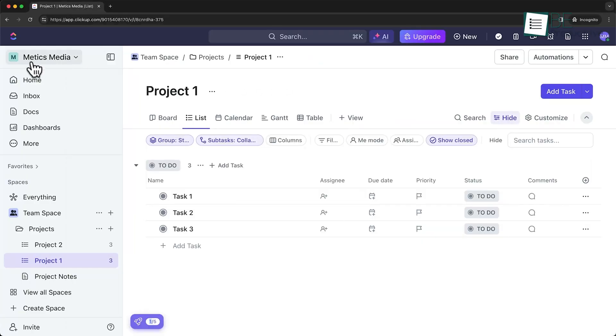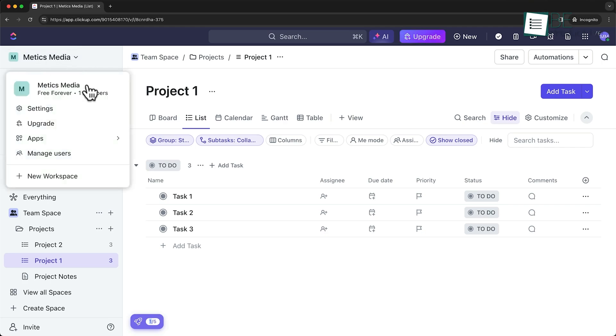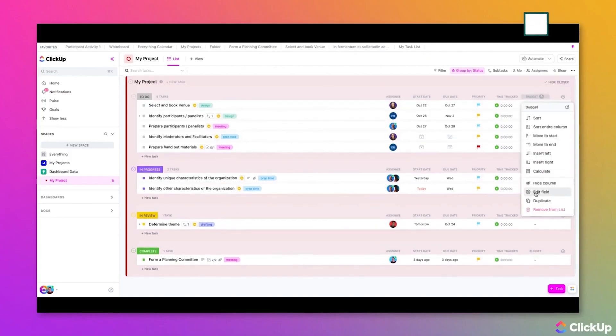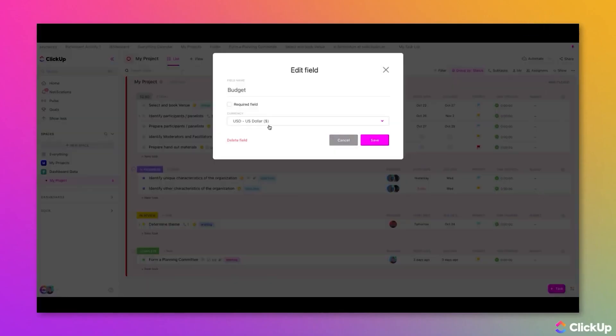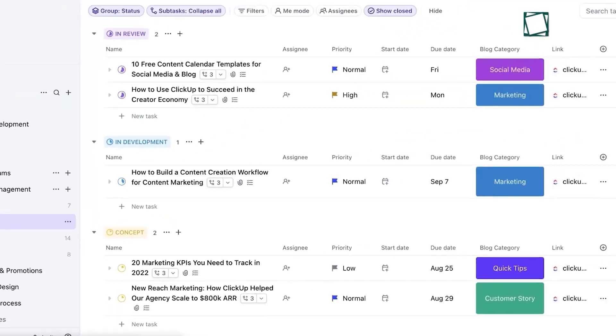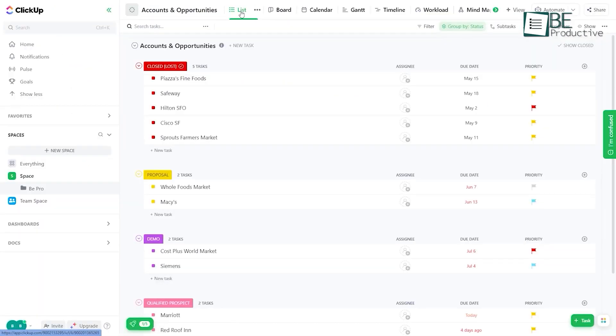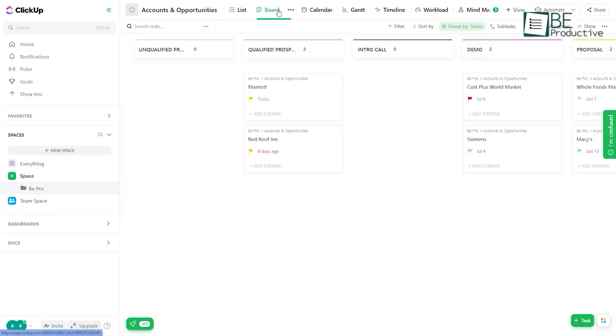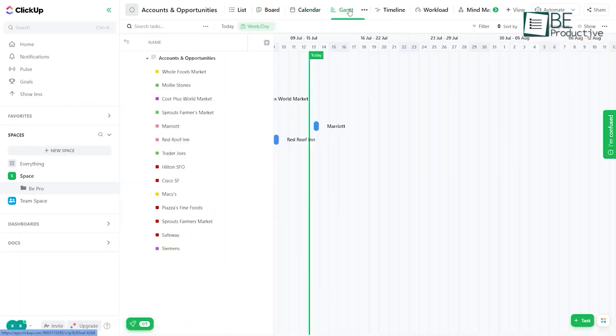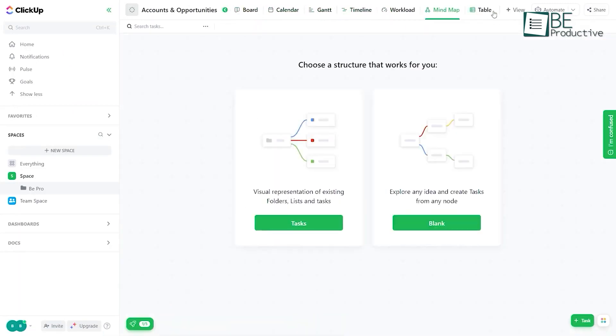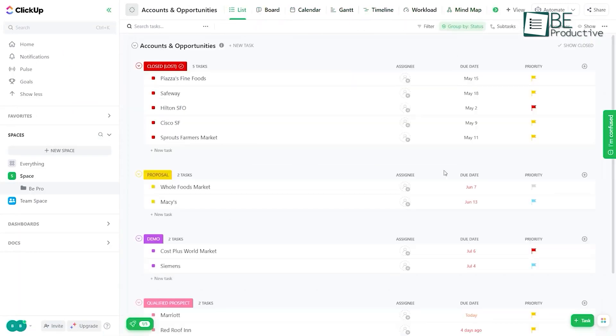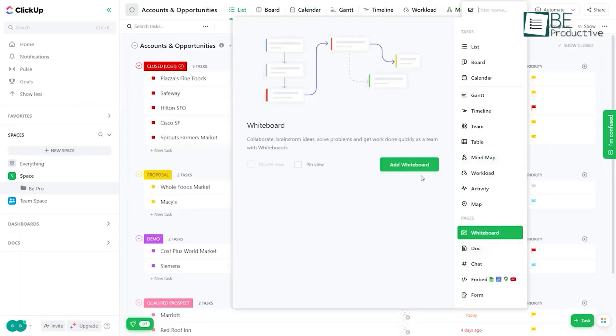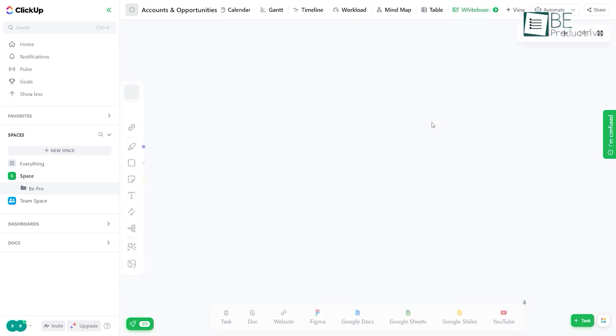ClickUp approaches resource forecasting with its workload view and custom fields. We could set up custom fields for things like estimated hours, then use the workload view to see how these estimates stacked up against each team member's capacity. What we appreciated about ClickUp's approach was its visual nature, which enabled us to quickly discern where we may be over-allocating resources in the future.